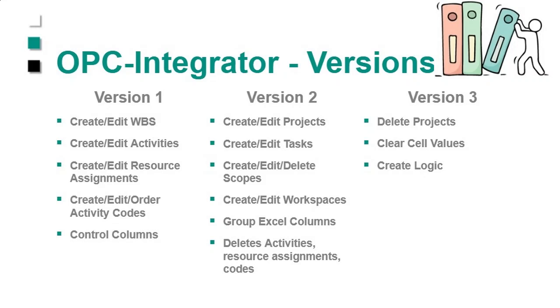That goes with activity codes. Activity codes are a big way that you can use coding inside of the tool to, as I would say, tag and bag everything. So you can flip your different reports, do filters and all that good stuff. That can also be time consuming to create, especially if you're doing equipment lists and things like that on a big project.